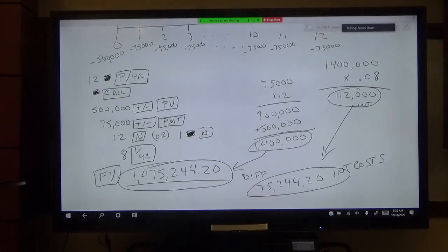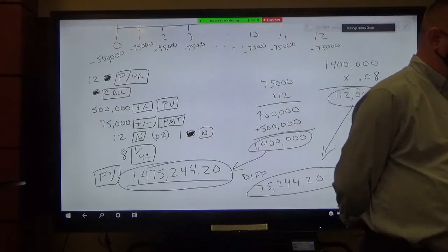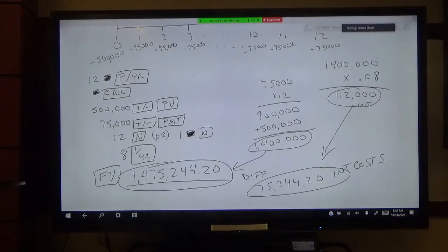Yeah, well, the big issue is what does it cost you? So from a contractor's perspective, he's going to look at what his outflow of cash is costing him per month. Many of the contractors will have a line of credit that they work from. So if the cost of using that money is relatively cheap, then they may be willing to go 45 to 60 days.